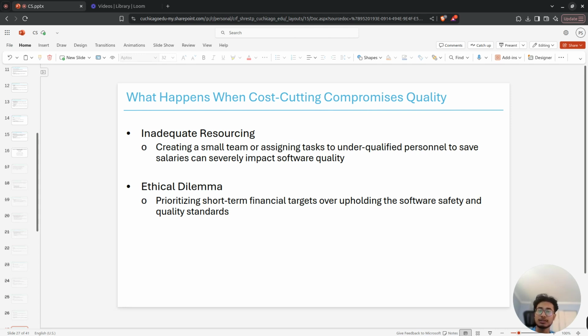To cut costs, deploying the software without proper testing, using a less skilled team, or making delivery time shorter without proper planning can result in deploying the software with less budget at present. However, in the future, in the maintenance phase, it results in higher maintenance costs, damages client and stakeholder trust, and introduces possible security threats. Thus, it is very important not to compromise on software quality as it can result in serious disadvantages in the future.